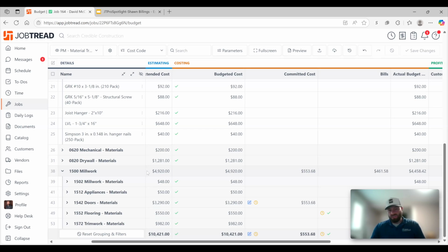If it's a negative change order and you're getting rid of stuff, I recommend 100% do not build a new item. Take the item you already have in the original estimate and put a negative number against it when you pull it into your proposal. Creating a new item just creates more things to look at, but you're just trying to zero out that initial item or items. So if it's a negative, 100% make sure you're using the same items. If it's something new, I create new items. That way I can label it something different or tag it so that I know it's not for the original spot, it's for somewhere else.